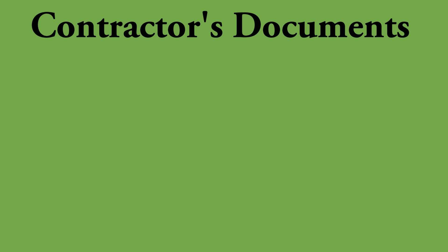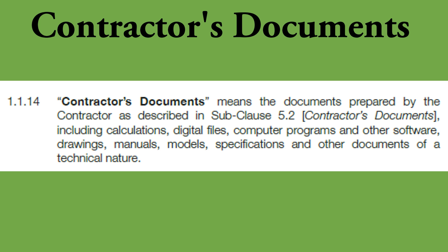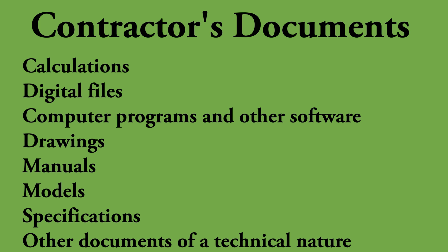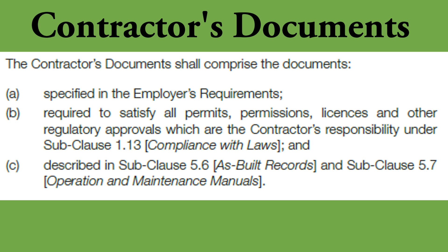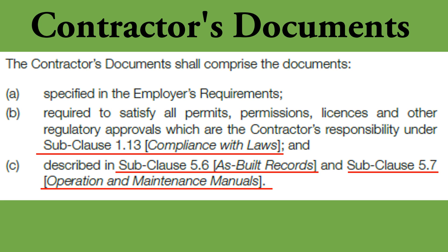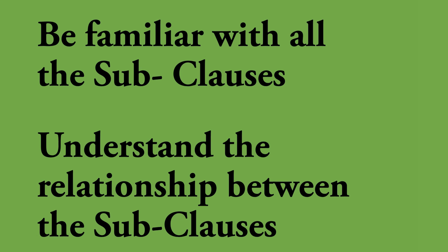Next I'll talk about 'contractor's documents', which means the documents prepared by the contractor as described in sub-clause 5.2, including calculations, digital files, computer programs and other software, drawings, manuals, models, specifications, and other documents of a technical nature. Sub-clause 5.2 says contractor's documents shall comprise, as specified in the employer's requirements, documents required to satisfy all permits, permissions, licenses and other regulatory approvals, which are the contractor's responsibility under sub-clause 1.13 compliance with laws, and as described in sub-clause 5.6 as-built records, and sub-clause 5.7 operation and maintenance manuals. In this document, most sub-clauses are connected to one or more other sub-clauses, so you need to be thorough with all these conditions when working with contract-related matters.